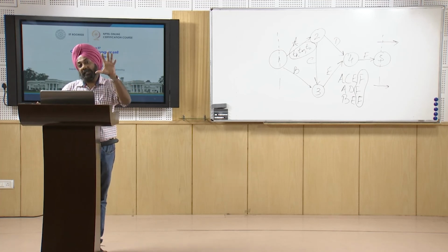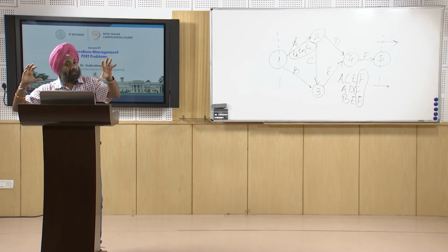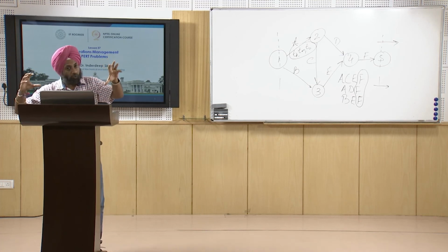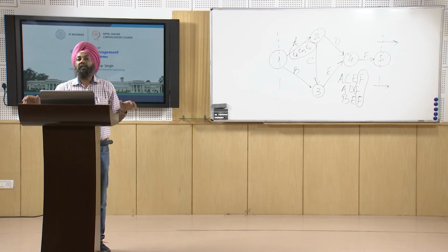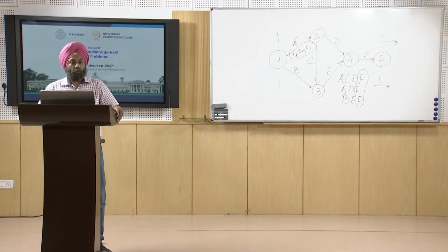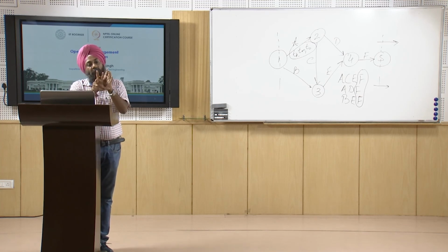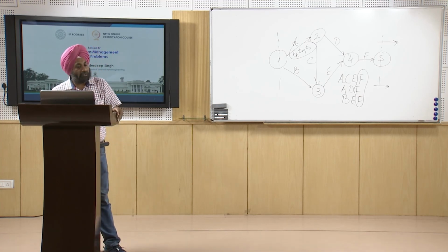In this case Z is known to us, the expected time that we have calculated from the critical path, 17, is known to us, and the standard deviation, or summation of standard deviation for the activities on the critical path, is known to us. Out of the 4 things, Z, x, mu and the standard deviation, Z is known and we have to calculate x, because mu and standard deviation are already known.